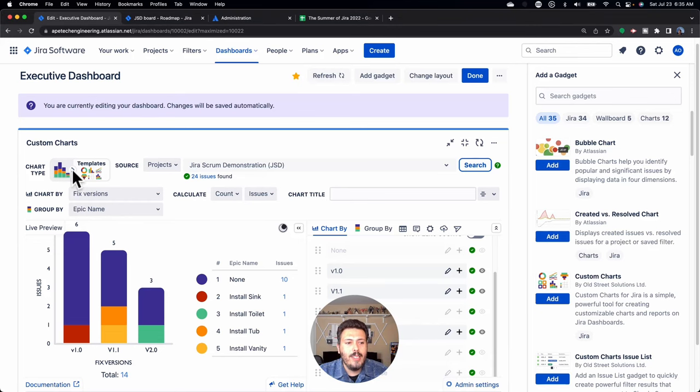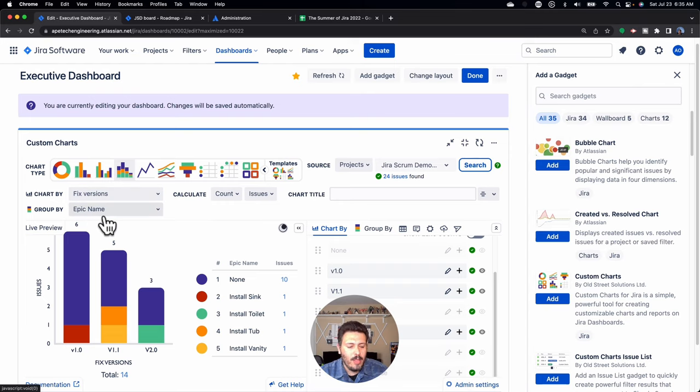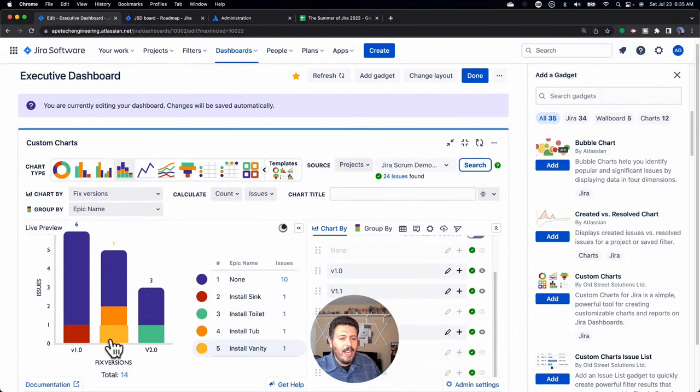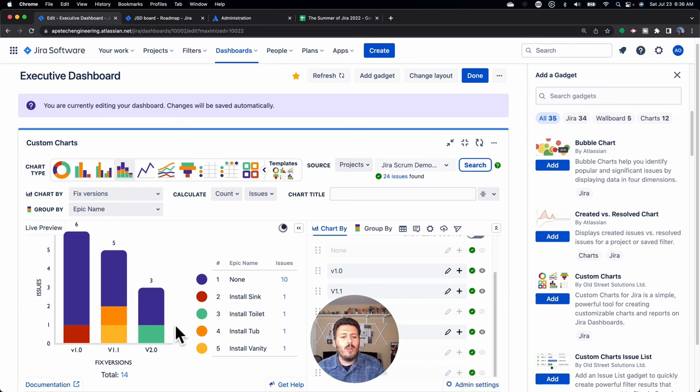This next chart is another 2D stacked bar chart — pick your project. But this time we're grouping by epic name and charting by the fixed version. This chart tells me for each release I'm working on, what epics — what major functionality or capabilities — are going into it. I don't care about the tech debt or bugs here; I want to know what major items are going into each release. When I'm communicating to my customer, I can put dates on my releases so I know when it will be delivered, and I can see if an epic flows into another release.